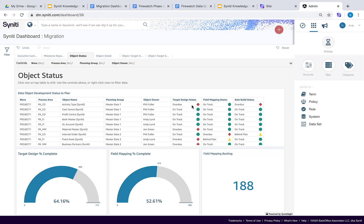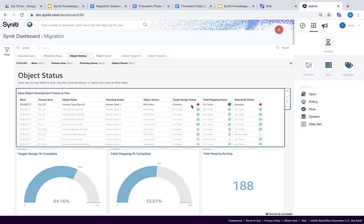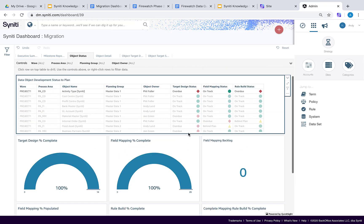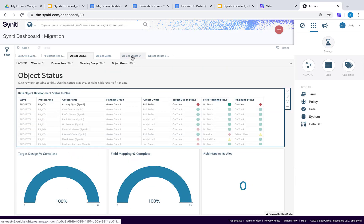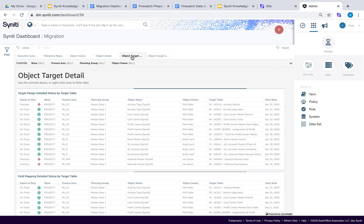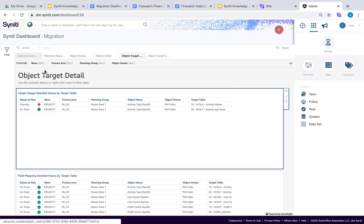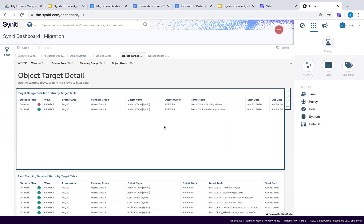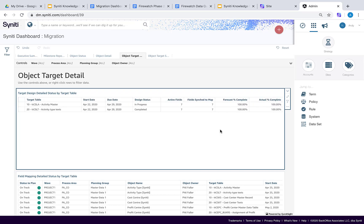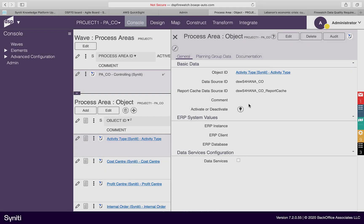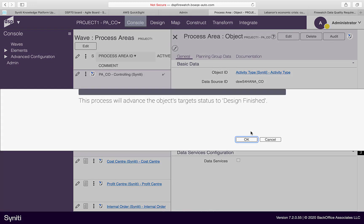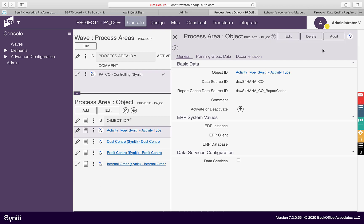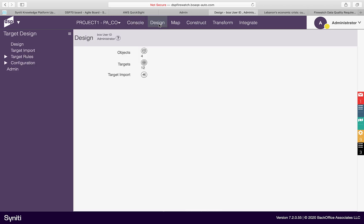In the following example, the target design status to plan for activity type is showing as being overdue, even though the target design percent complete is 100. By drilling down into the target table detail, we can see that the design due date is passed. However, the target table design status for one of the tables is still in progress. To rectify the problem, assuming that the design is actually complete, the consultant responsible for the objects should set the object to design finished. This will set all the target tables with this status and then update the design status to plan to on-track the next time the metrics run.